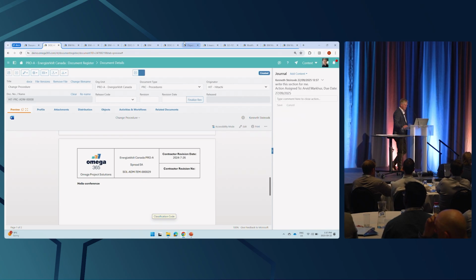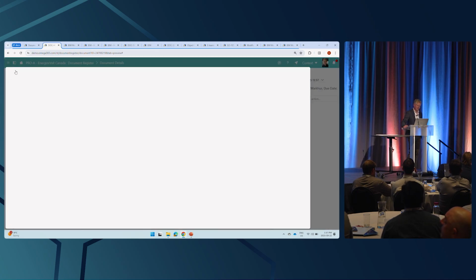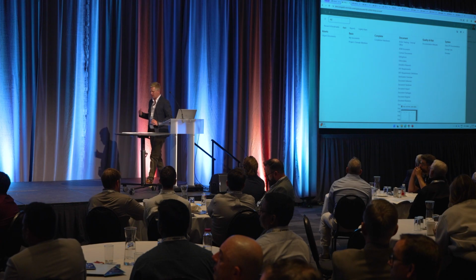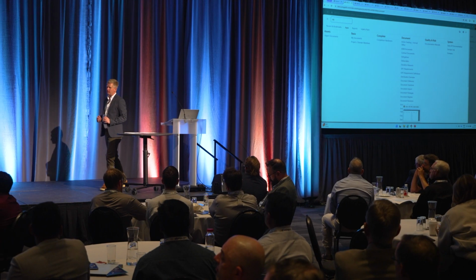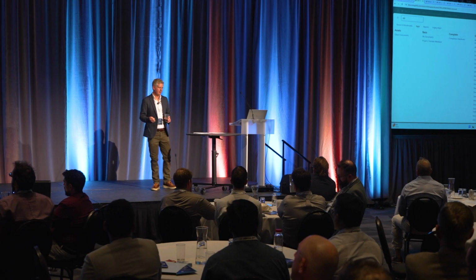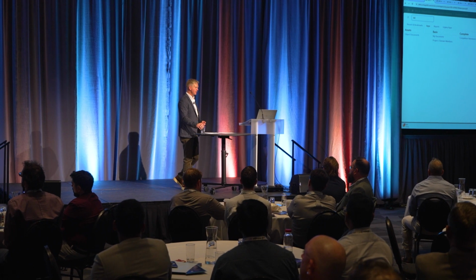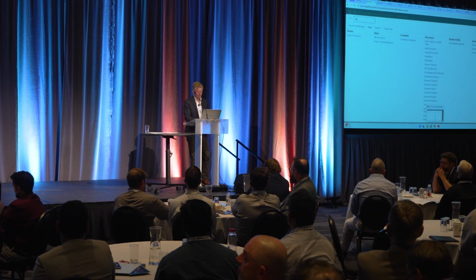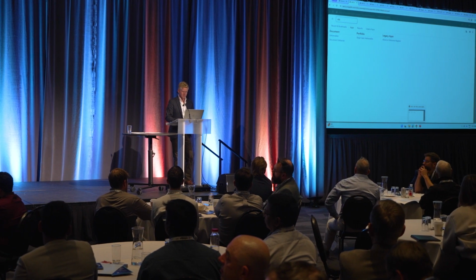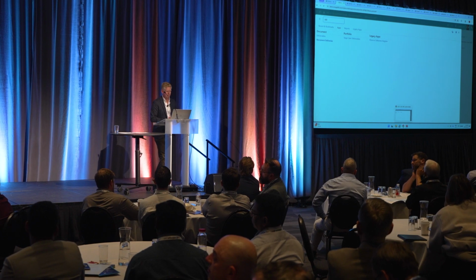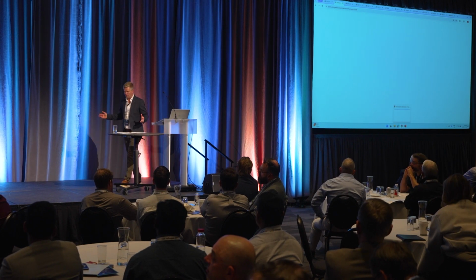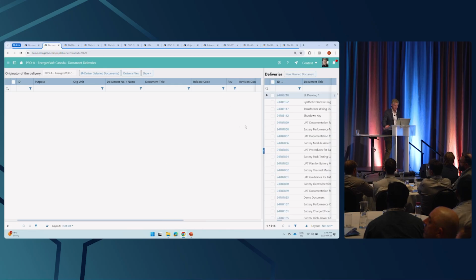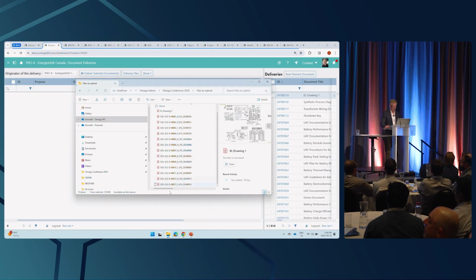So the last way to really interact with getting documents in is either if we are in a migration, or if we have EPCs and you need them to submit their recent files to you. We have what's called deliveries, document deliverables. This is their portal where they can dump in their information and submit it to you. So an example will be: